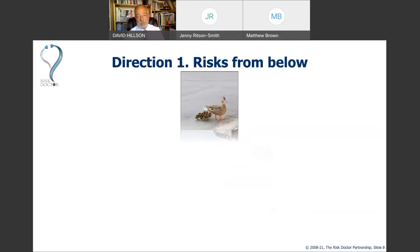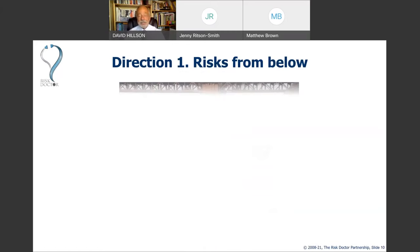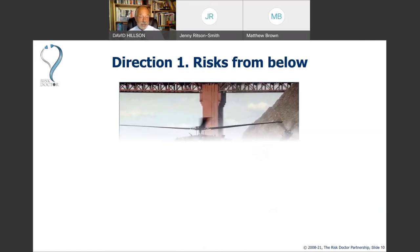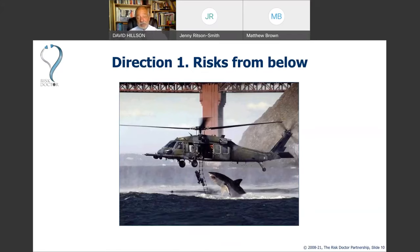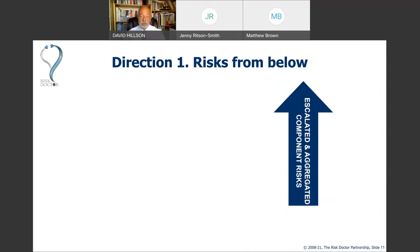Starting with risks from below: there are things that can leap up at us at the programme level from below that could affect us. There are four sources of uncertainty at the programme level that come up from our programme components. Programmes can include projects, sub-programmes, business-as-usual activities, and operations — all of which can generate uncertainty that escalates or aggregates to programme level.